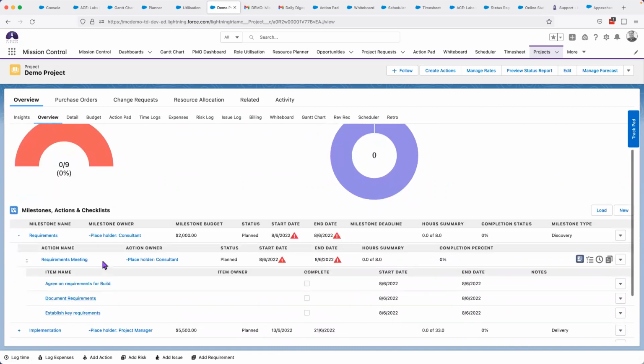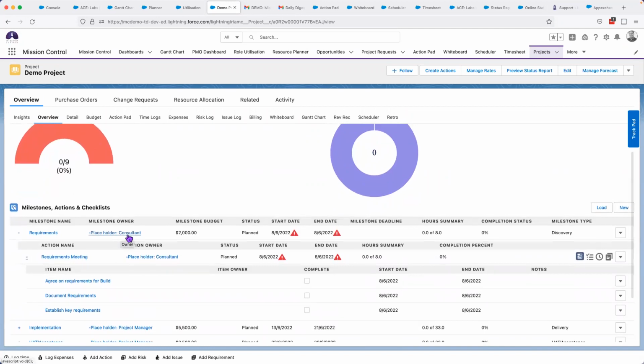So first of all, I've got a placeholder consultant role. Again, nice little best practice, so you know what sort of role you need. You can also put your costing and your charge in there as you're building out your project. This project is fixed price milestone. I've set a milestone budget. I've also got a setting to say when I complete a milestone, I'd like to generate an invoice for that amount, please. And I've got tax set on my project. I'm using Australian goods and services tax, a nice flat 10%, and that'll actually factor that in on the invoice.